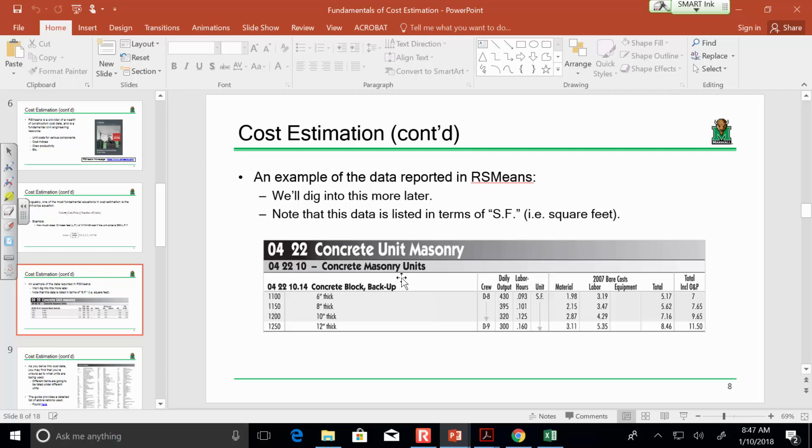Yes. It was from either one of two places. It was from either the actual material cost for a W14 by 74, or it was from the back, where, give me a sec. Oh, I have it marked. Where all the work crews are listed. So this was crew E2, because E2 is a steel crew. That's for the column. So when you're doing your cost estimation, you can use either or. You can either go to the listings in the back to get your cost, or do it individually.